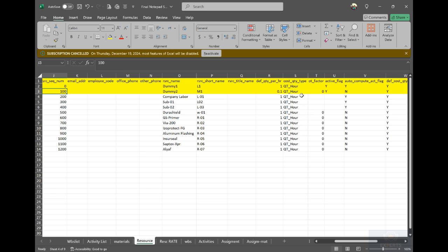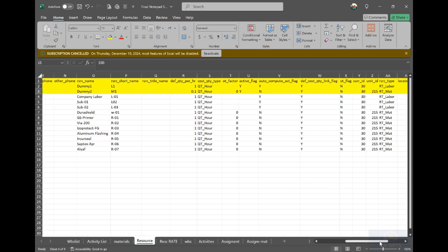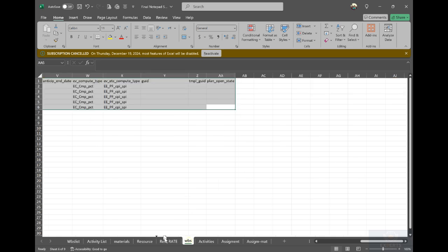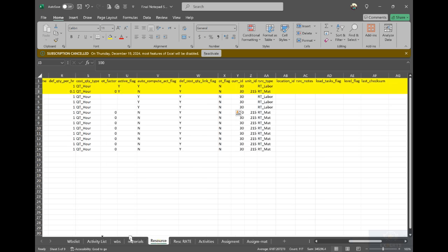And here you will also copy and paste. Whatever is 0 I will keep 0, whatever is blank I will keep blank as per Primavera; whatever is yes I will keep yes, no is no. Then I will keep everything in the same sequence as Primavera. Then I will take all this, copy it, go to Notepad and paste it. After that we have the WBS and the resource, and the resource is okay here. After that you have to define the activity.